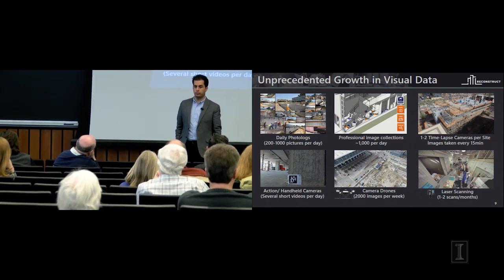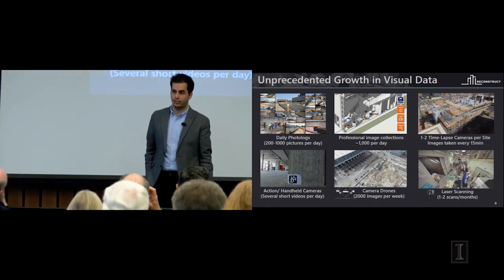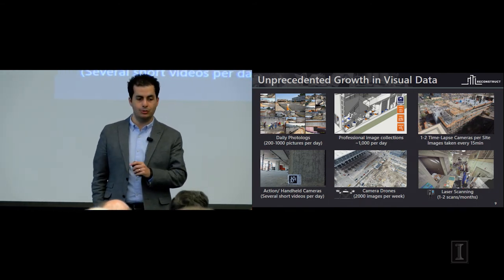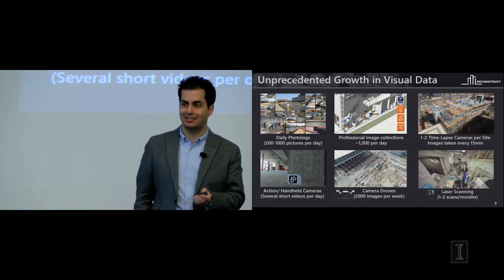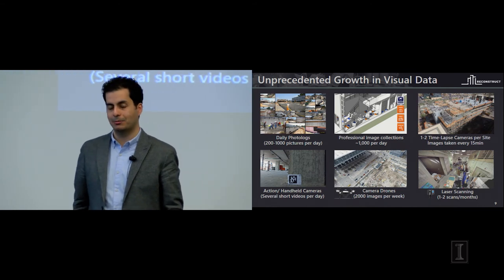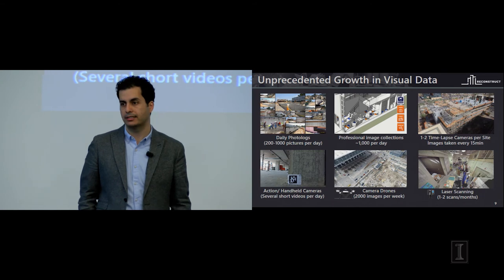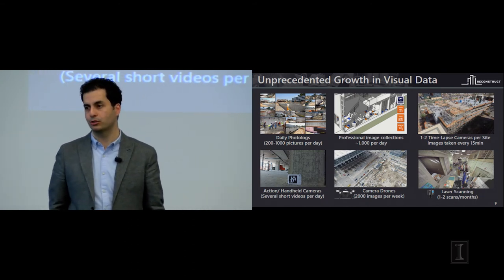There are a number of creative ways of establishing alternative dispute resolution techniques on job sites that actually would be extremely beneficial to them. We usually call this a preventive claim management system, a system that would prevent legal issues from happening as opposed to one that would react to them. But absolutely, this visual data is great for making the case, because there's no way you can modify it. It actually shows you the truth.